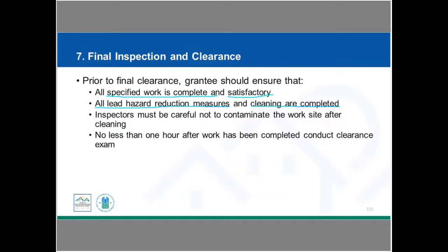And then something that's important to know about on timing on this is that we can't do that clearance testing until at least, at a minimum, an hour after all of the work has been completed and that cleaning has been done. Why would we have that rule in place? Well, one of the things that we're particularly looking for is the presence of lead dust. And so it kind of goes back to that old cliche, but we may have to wait for the dust to settle on this project.